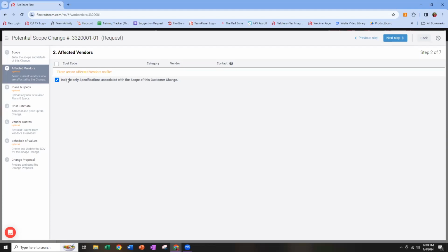It's going to list all cost codes that I have buyouts for. It's going to list the applicable vendor name and the cost category: labor, materials, equipment, subcontract, other. This is allowing me to check a box next to each vendor's name or each cost code. I'm going to see a checkbox here where I can check the box to say, yes, this vendor is going